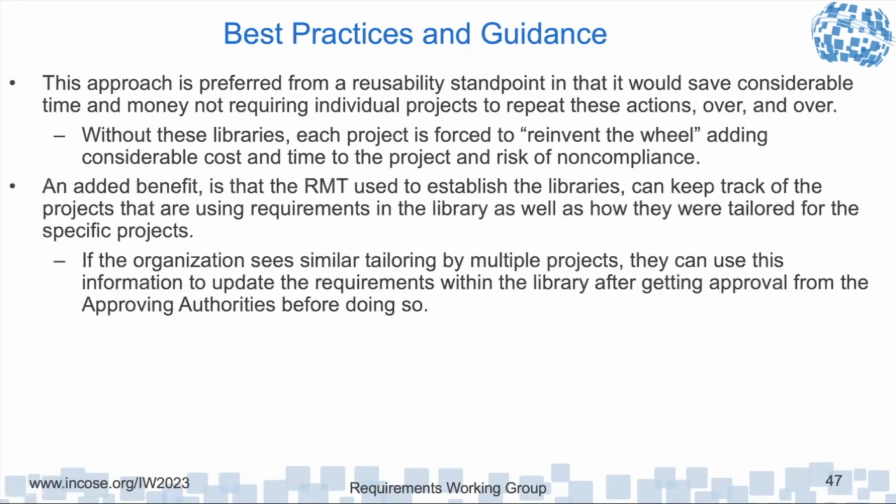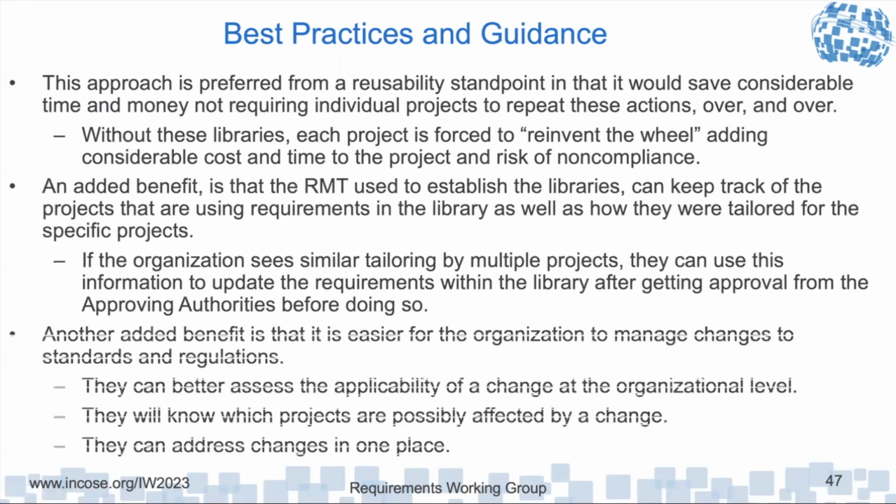An added benefit is that the requirement management tool used to establish the libraries can keep track of projects that are using the requirements in the library, as well as how they were tailored for the specific projects. If they see similar tailoring for multiple projects, they can use this information maybe to update the requirements in the library after getting approval from the approving authorities before doing so.